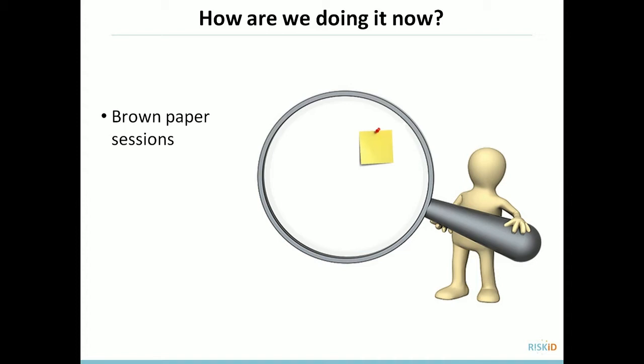Also hierarchy: if your boss is in the room, you won't mention that maybe you think he is a risk. It won't happen. And also, with the human aspect, we are very problem solving. So when someone raises a risk, other people are already trying to solve it with mitigation measures. But at the end of the road, you might be talking half an hour about a risk and measures on a very low risk. So that process is not really structured in that sense, because the human wants to go directly towards the measures, etc.